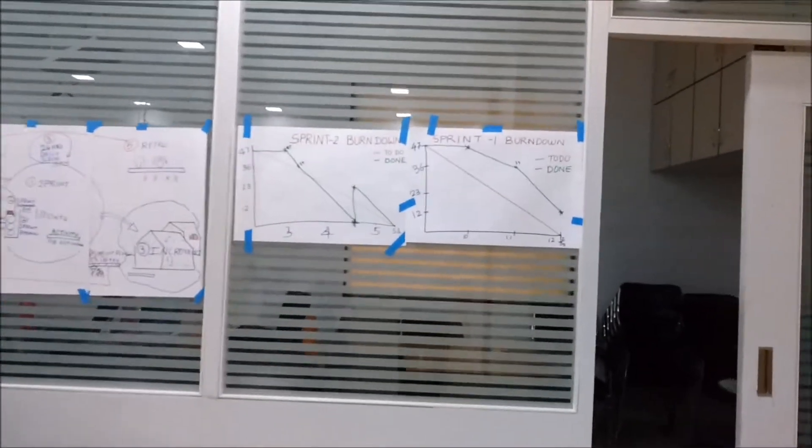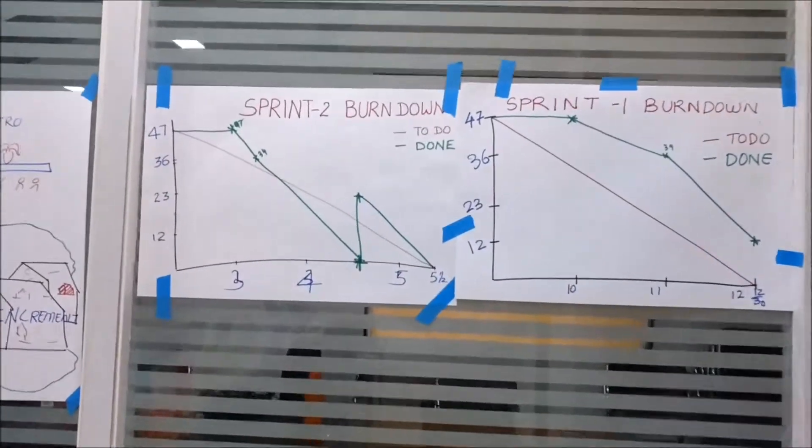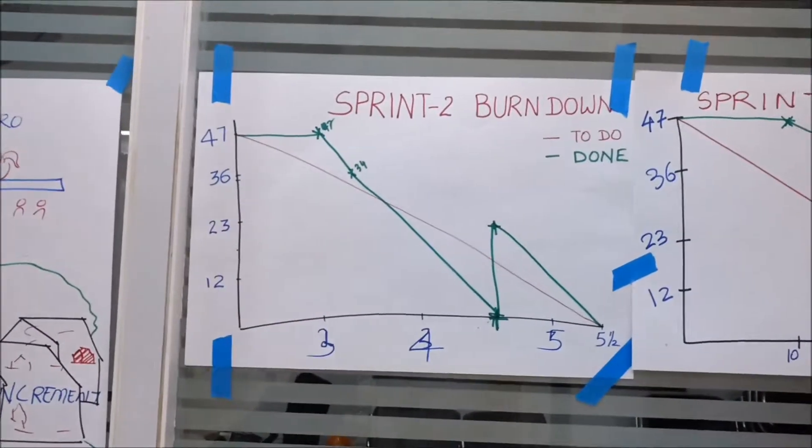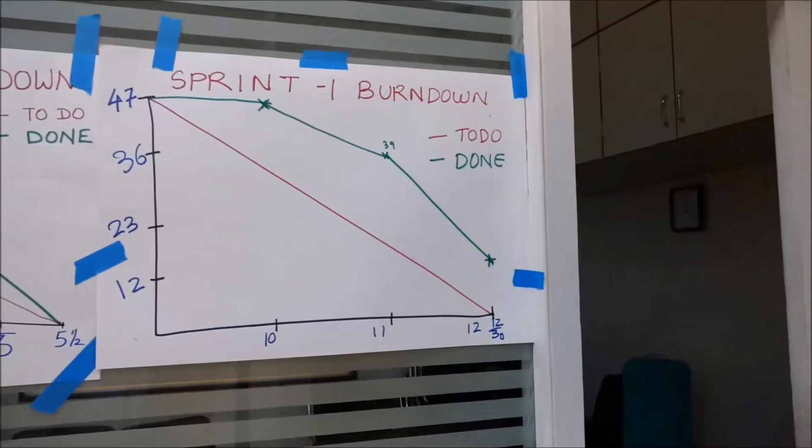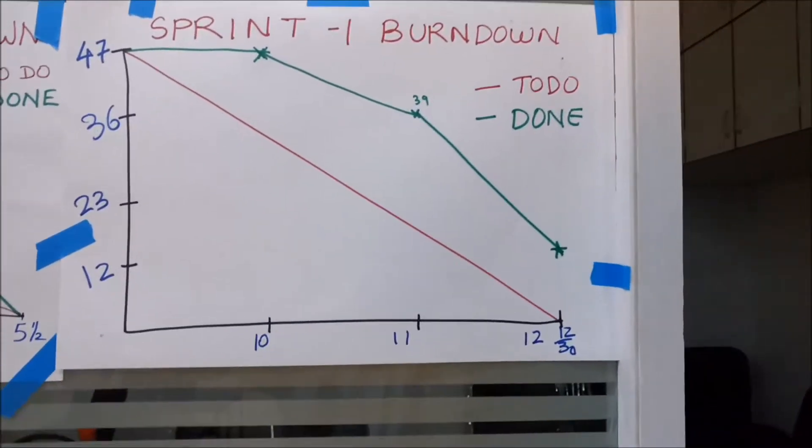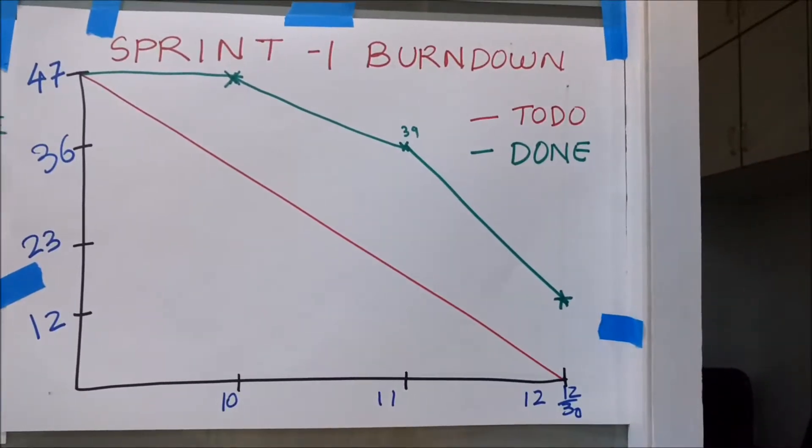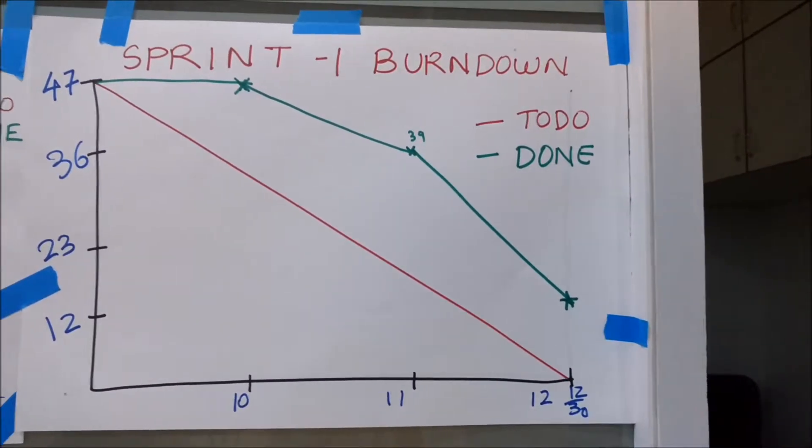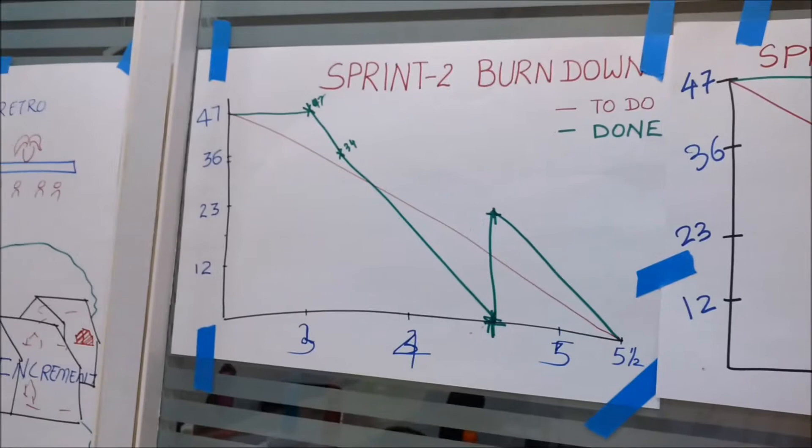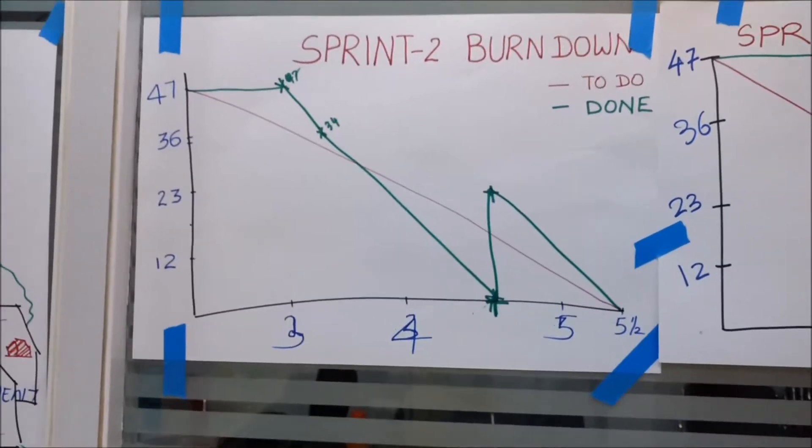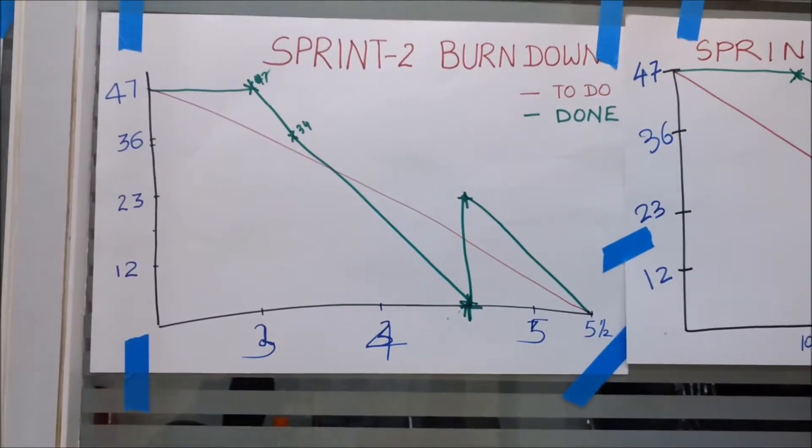Now I have simulated a few conditions related to the product backlog. I'll just show this sprint burndown that I have drawn. You can see that in the first sprint I have simulated a condition where we have not been able to complete all the items, and in sprint 2 we have simulated a condition where we had an early completion of the sprint, so we took up another item and we took it for execution.